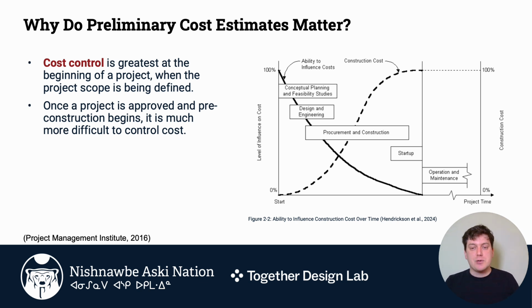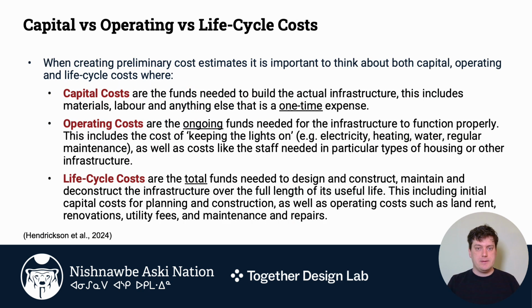But returning to Module 1.1 and the scope of the project, what we learn here about budgeting is that the tighter you can draw the scope of the project, the more precise and focused you can be in what your project is taking on, the better you are doing in controlling costs down the road. You're trying to reduce the ability for scope creep, as we mentioned before, or for uncertainty, or for future changes that are going to dramatically impact the budget. So use this opportunity when you have virtually total control over the budget to make things as clear as you can make them and reduce risk down the road.